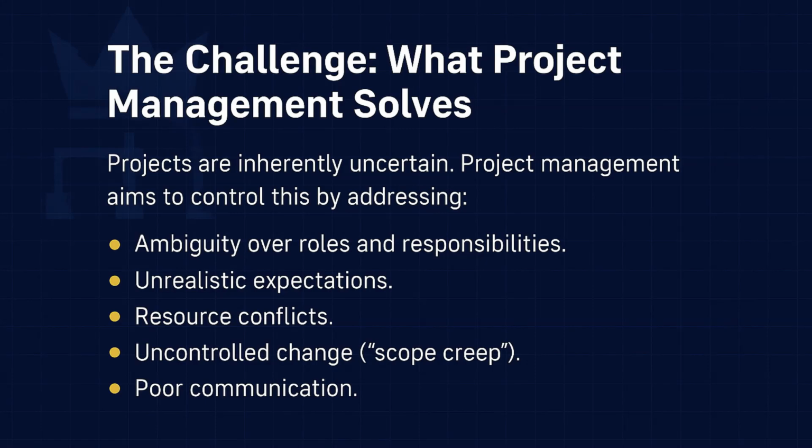Okay, so SU is the check, IP is the detailed planning or proposal. What's happening at the board level while this is going on? Good question. The project board, the highest level of project governance, operates within the Directing a Project process, or DP. DP, and that runs throughout. Yes, DP runs from the very start, even before SU really kicks off, right until the project is closed. It's the process the board uses to make those key decisions. Authorize initiation, after SU, authorize the project itself, after IP, authorize each subsequent stage, provide direction, and respond when the project manager escalates an exception.